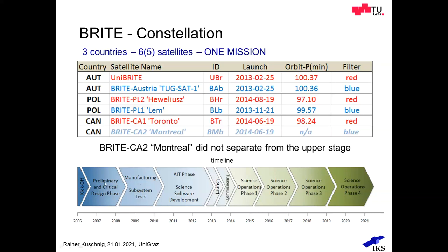So you go through a preliminary design phase, then this has to be sanctified by your agency or by the review board, and they say, yeah, you can manufacture now, you can test and build the stuff. Then, especially with smaller missions, you eventually have to wait for launch for a while, because you're not the primary payload, so you have to fly like you fly Uber, with somebody that is the main payload, and the launcher allows other secondary payloads. That's something that has to be factored in. Sometimes small satellites are developed within a year or two, but then you wait 3 years for launch.